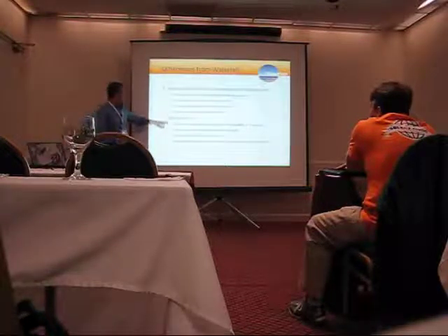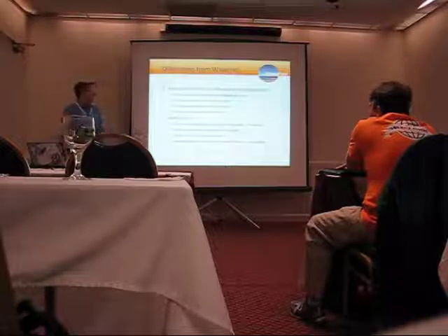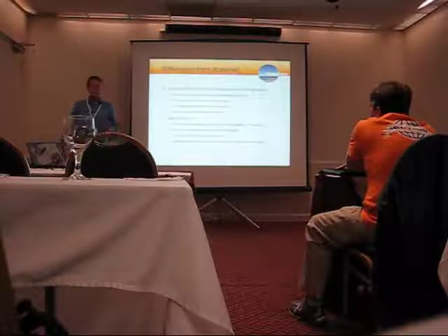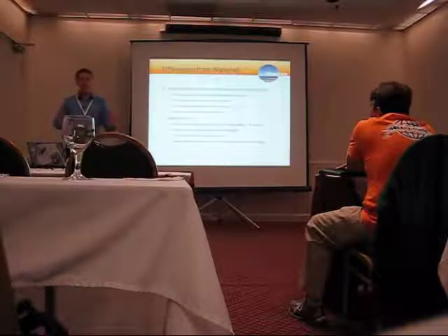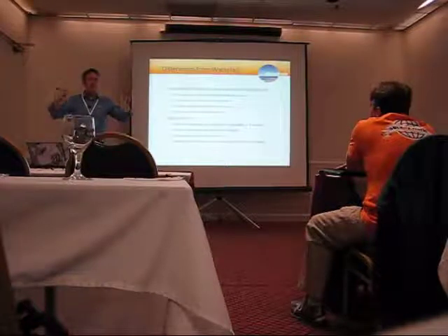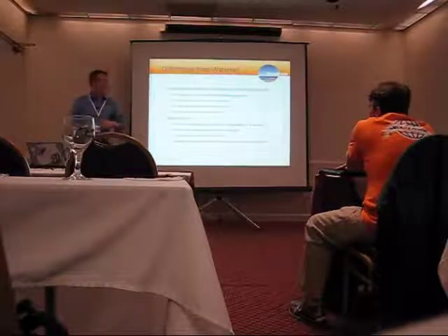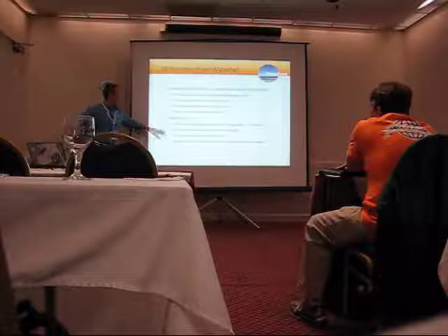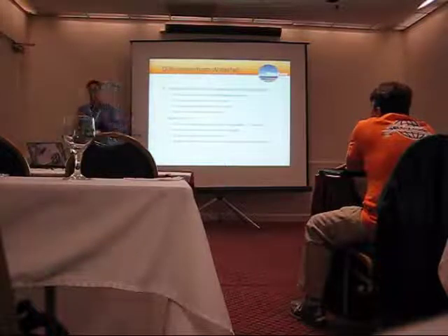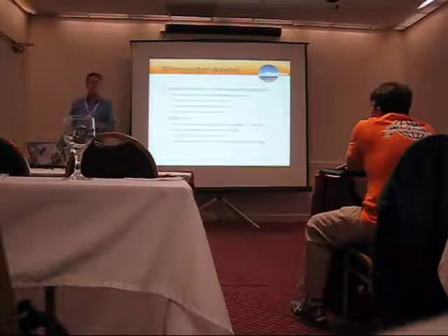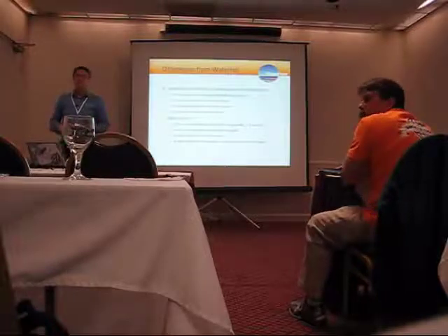Effectively, your work is only planned for each sprint, and sprints are typically 2 to 4 weeks. You can have longer sprints, but normally we recommend a sprint as a unit of developer activity for about 2 to 4 weeks. The work accomplished determines the releases, not some arbitrary date. Yes, sir. That's really the deal.